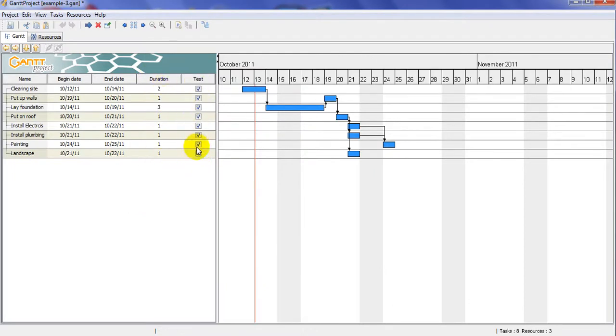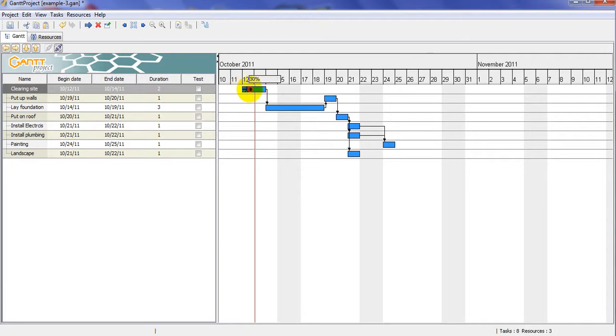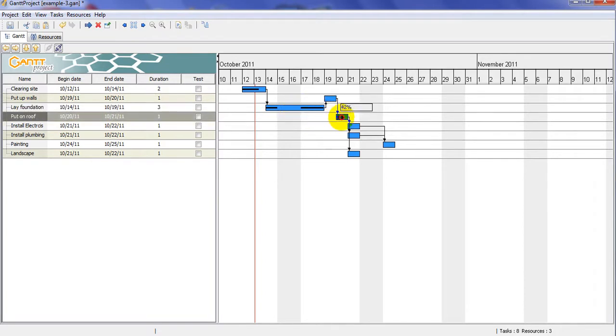So you have duration here, and you add here, and then you can click on it, whatever that is, yes or no, and positive or negative. One more thing is, if you just hover the mouse above that, you will see this black triangle come. You can simply extend it, and it can show how much of this task has been done. For example, if this task has to be done in 4 days, and assumingly each day you have to do 25%, and you are in day 3 and you have done 25%, you know for sure that you are behind and something has to be done about this task.